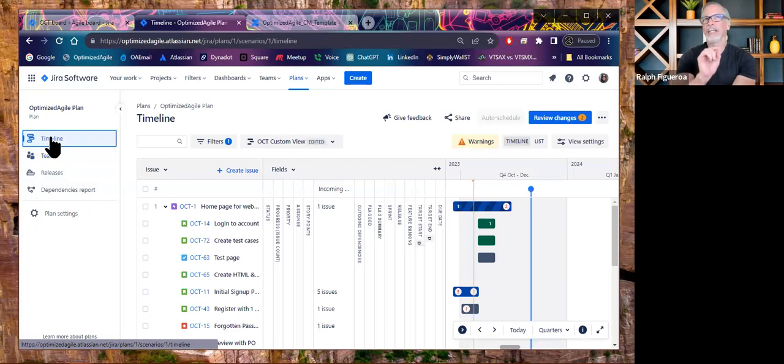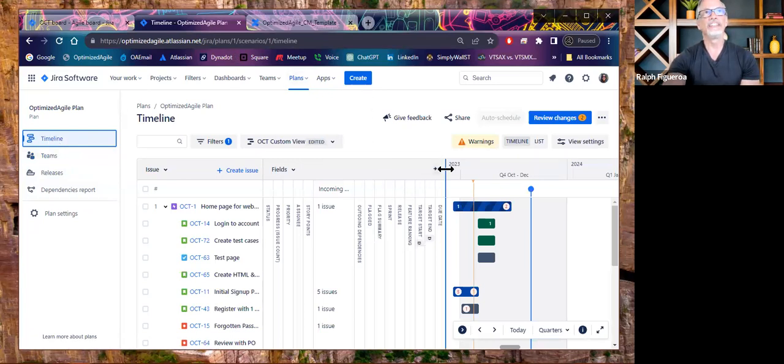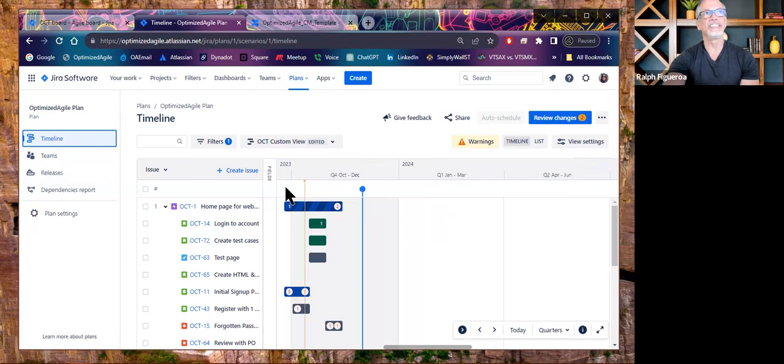that capacity planning also extends to when you're looking at this timeline view, and it breaks this timeline view with the sprints as they relate to time. And it will show you when you're exceeding the capacity or the velocity of the team. It'll give you red dots or green dots showing you the health of that sprint based on the capacity and velocity of the teams. Really cool stuff. So I apologize for not having that ready to demo.